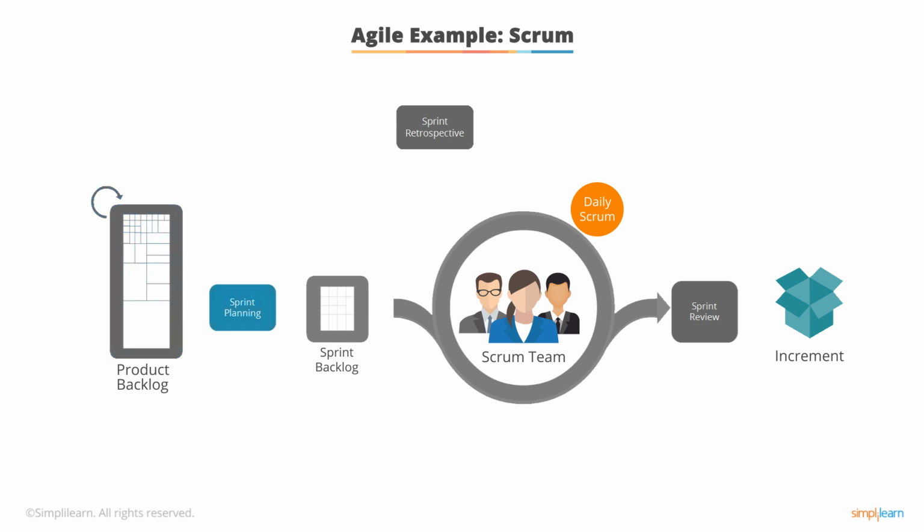And that's called sprint planning. And what happens in sprint planning is typically the leadership from the software development teams, someone from development, someone from operations, someone from QA, someone from business, and someone from products, and others will get together and they'll look at the backlog, the product backlog, and they'll create a priority. And they'll say, okay, in this sprint, we're going to implement features A, B, and C.